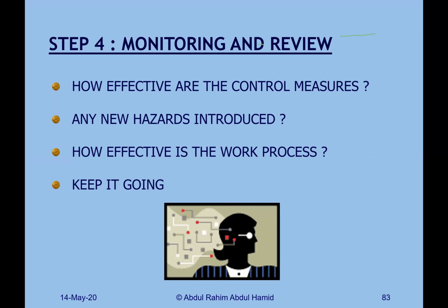And then the project goes on, and you never know what changes could happen, with new people coming in and out of your workplace, new work processes, new material introduced, and the assessment that you did is not going to be accurate anymore.